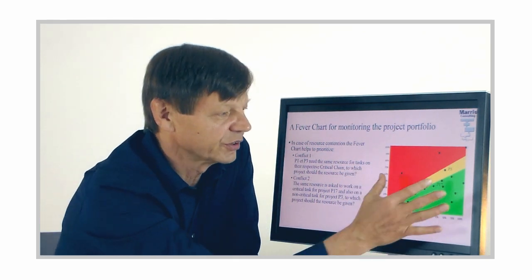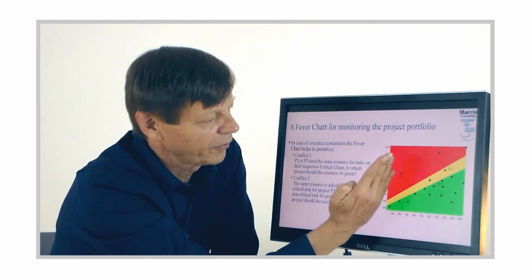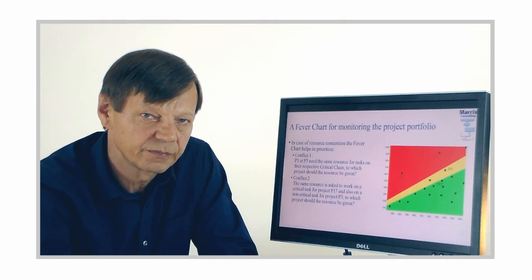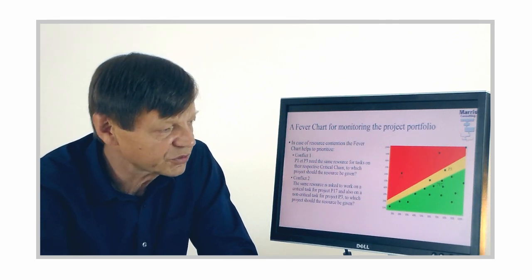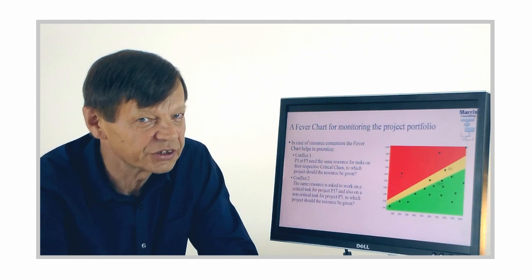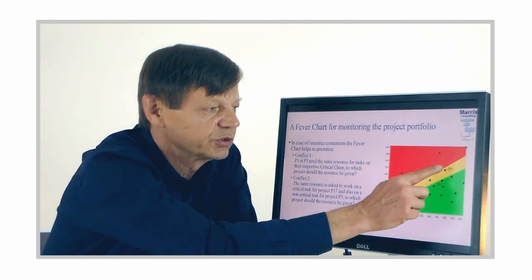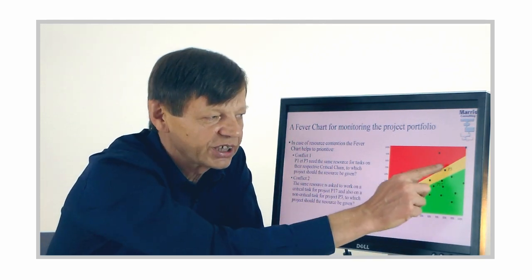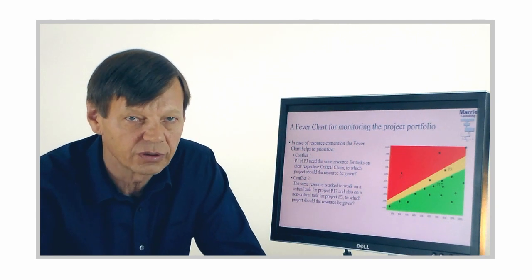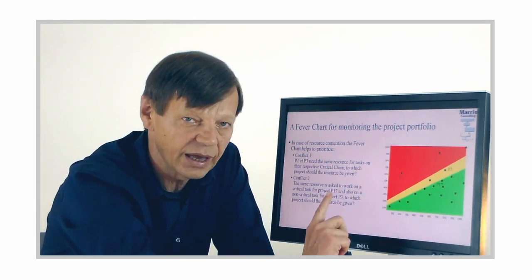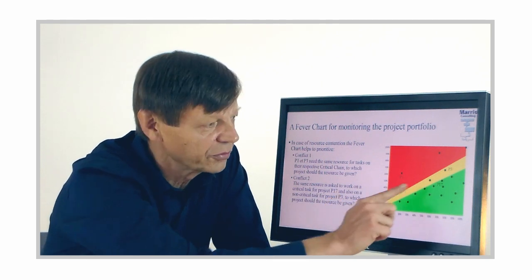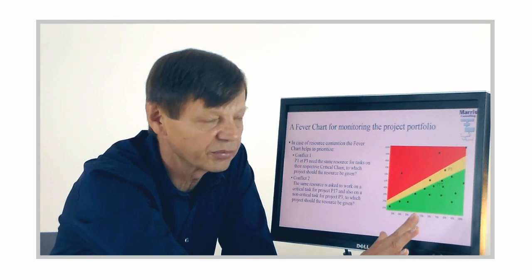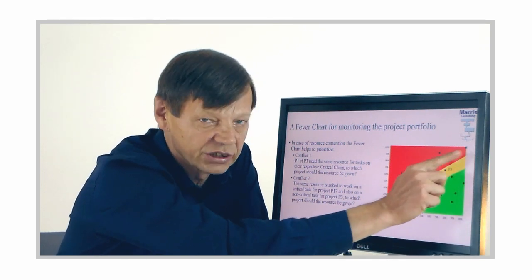So Susan looks at the fever chart. She has either to work on that one or that one. Well, it's easy. I work on P1. That is the priority, right? And that's remarkable because I think most companies that are not using things like critical chain will probably get Susan to work on that one. Why? Because among other things, all their projects are late. So that project is actually late. It's nearly finished, so they want it out the door. Okay? In this environment, everything is on time, right? So that's, if it carries on like that, it's just going to finish a little early. It's not a big problem. P3 is going to finish a little early. Okay?